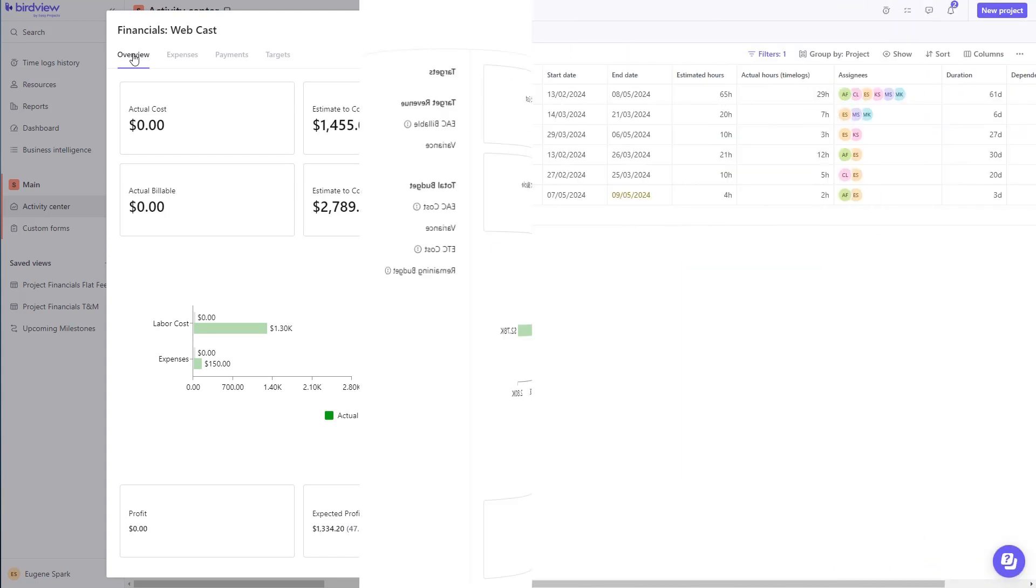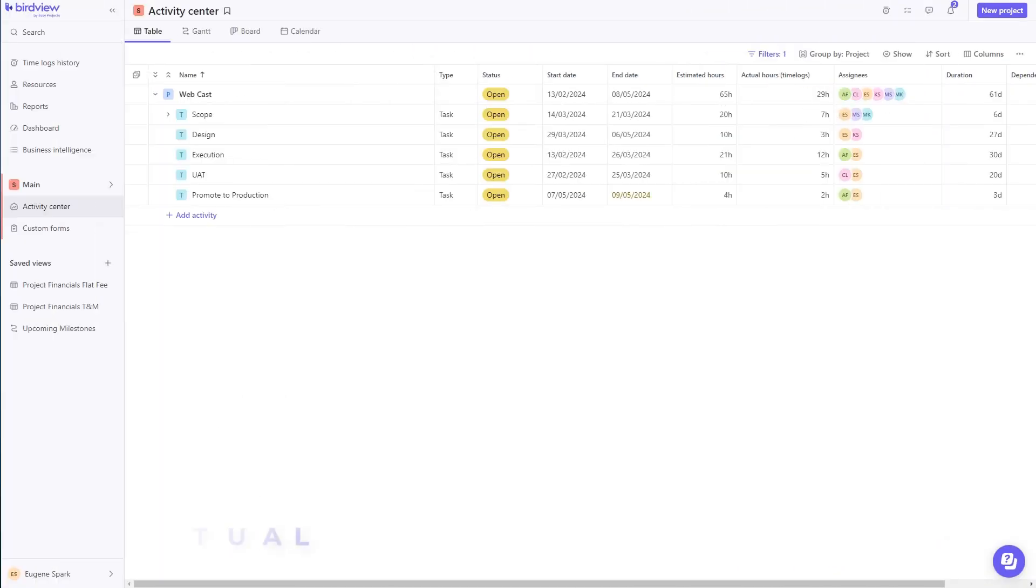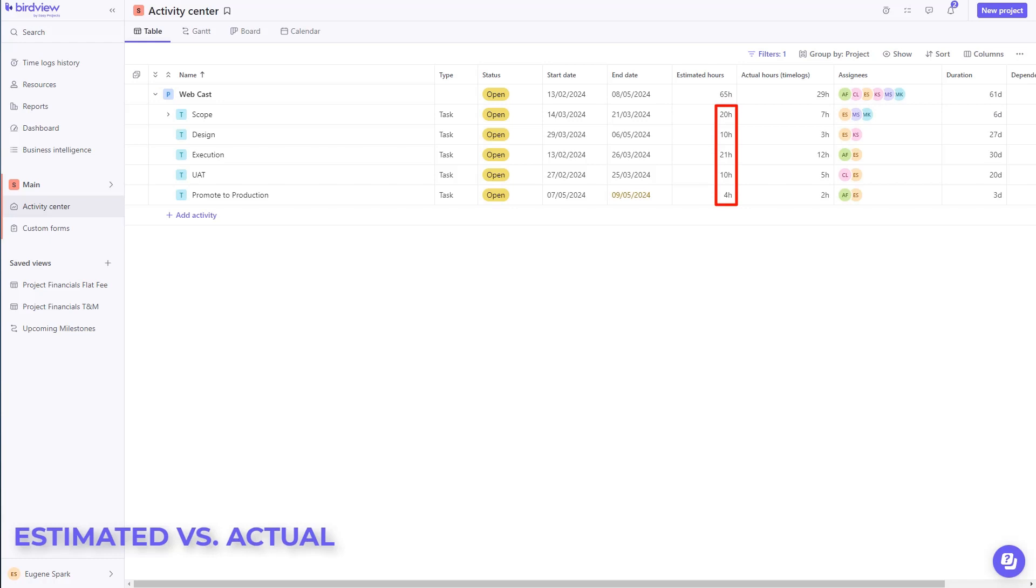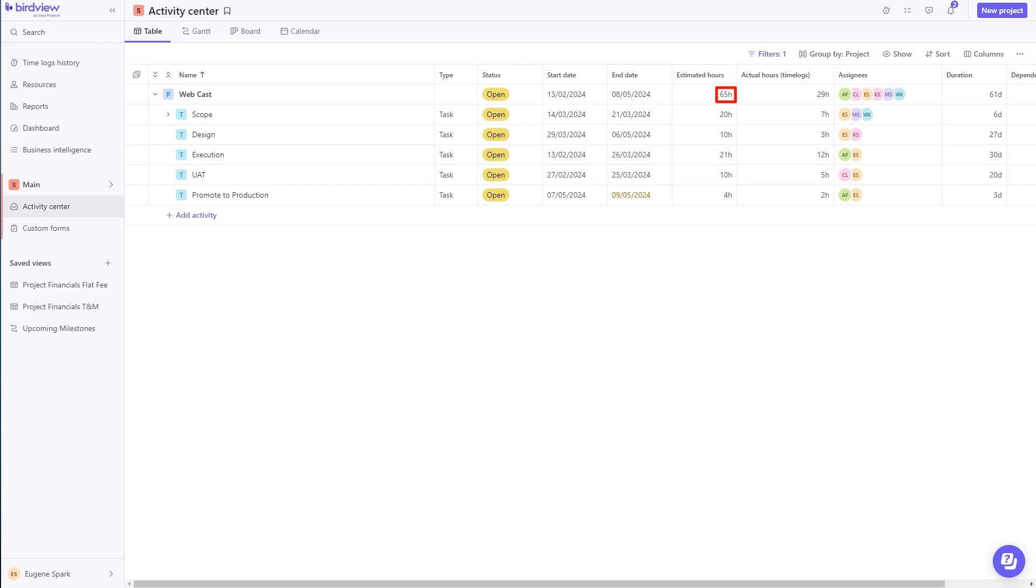Need to track estimated effort versus actuals? In BirdView, we follow a bottom-to-top approach. Estimated effort that is defined at a child task level rolls up to the top-level task, and that information now rolls up to the project.